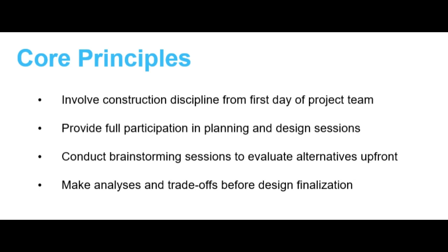Once options are listed, the team compares them against project priorities. If schedule is critical, choose methods that reduce time, even if slightly costlier. If budget is tight, choose methods that reduce cost without harming quality or safety. If performance is crucial, select higher quality systems that justify life cycle costs. So the structured comparison leads to a deliberate, not accidental, choice.